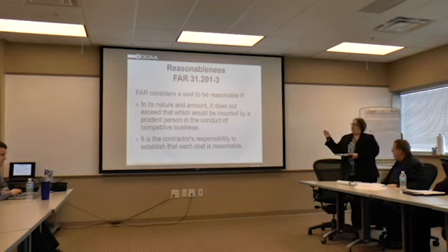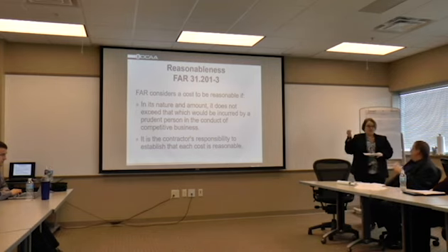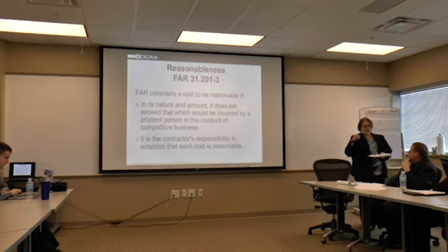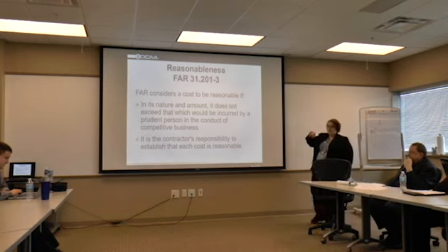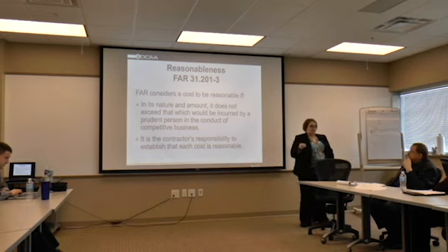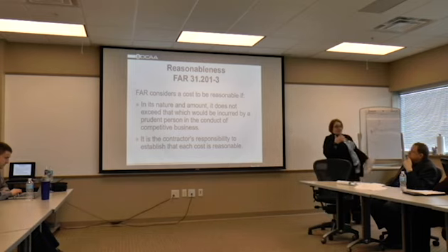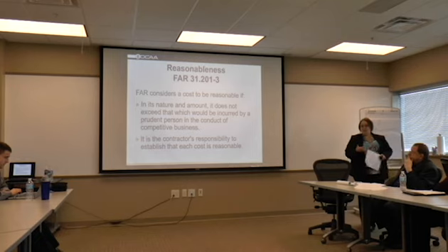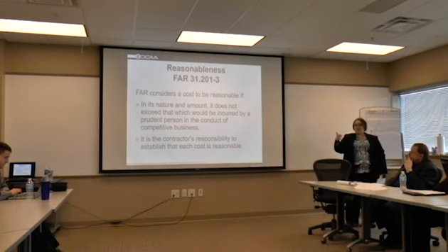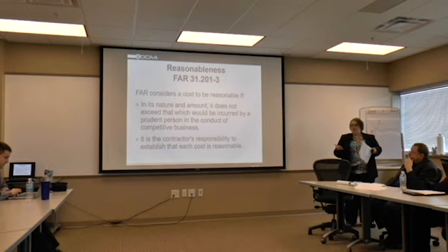Another place where we run into this a lot in the proposal environment is escalation factors. So when you're trying to determine what your costs are going to be for those out years on that contract. Say you're proposing an escalation of 10%. We subscribe to indices that we utilize, but we also evaluate what is your support behind that 10%. What did you use to come up with that 10%?